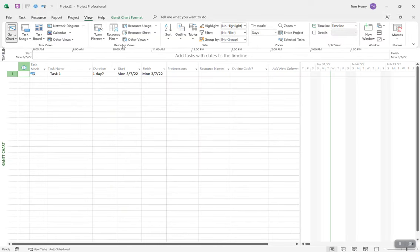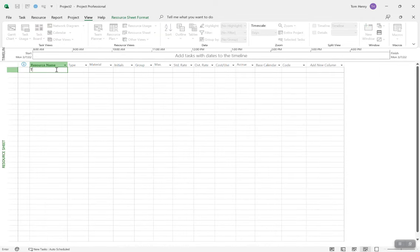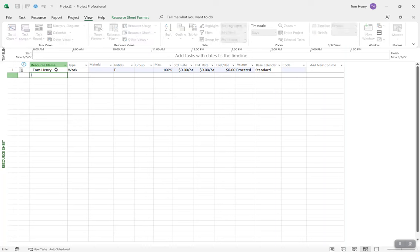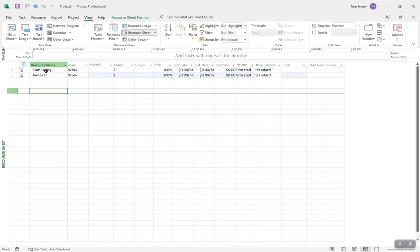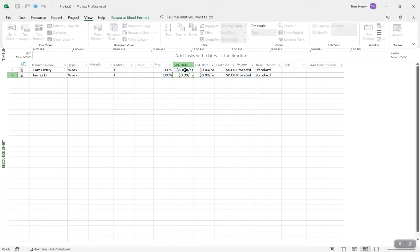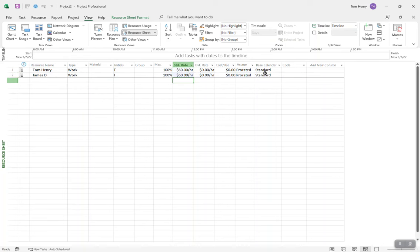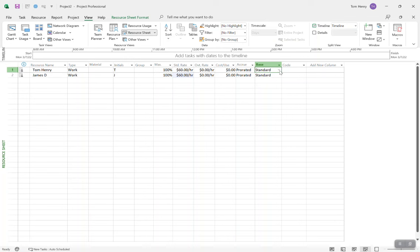For resource views, click on Resource Sheet. I have no resources yet, so I'm going to put Tom Henning and James D. in quickly. You can set up standard rates — I always go with $60 an hour — and we can see their base calendars. They default to the project calendar. If you give a project calendar with exception days, it will add those as defaults for your resources. You can also change the calendar for individual resources, and the resource calendar will overwrite the project calendar for those resources.